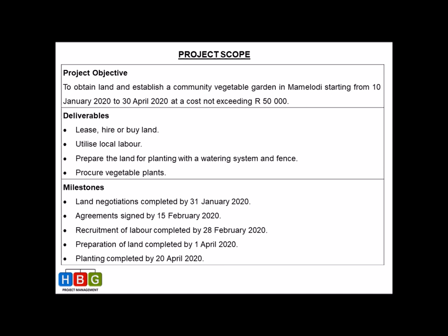Then we look at milestones. A milestone is a quality checkpoint along the way where you check that your deliverables have been achieved by a certain date. Milestones are always linked to a date, and I derive them from my deliverables. Here you can see: land negotiations and agreements, recruitment of labor, preparation of the land must be completed, and planting completed — all with specific dates attached to them.